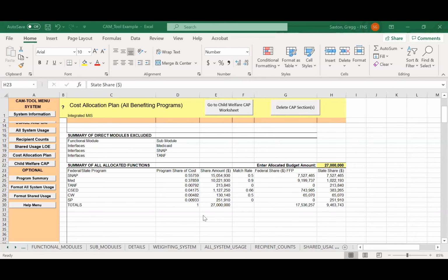And this is John Allison. So for Medicaid IT projects, it is a 90% FFP rate for design, development, implementation. So for building the system, it's a 75% FFP rate for operations of a system. So to the person asking the question, again, if it really is one Medicaid matching rate at 90% when you are building or developing or procuring or implementing the system. I don't know if that helps, but just wanted to weigh in with that.